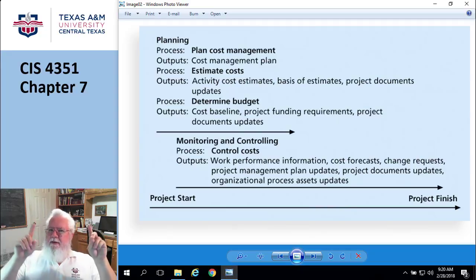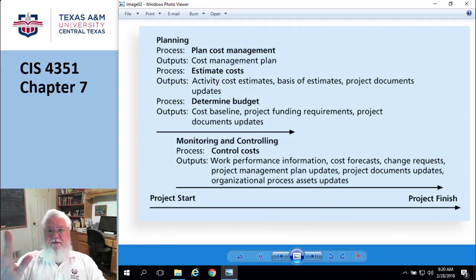I know it's kind of counterintuitive because it sounds like you should say, well, I spent whatever it is, $250,000 of my company's money, and dang, I don't want to be embarrassed if I'm not producing anything, so I think I'm going to go ahead and approve this project to go, even though the project is bad. That's going to get you into trouble. Okay, so one more time. You can't get the sunk cost back either way.